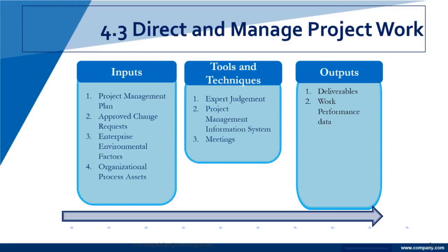Who's doing what work and how are they doing? You may have to deliver that to someone because you're in maybe a matrix situation. The functional bosses of people may want you to give them a report. If you're working with a development team, that development manager may want to know how they did. Testing team, same situation. It depends on how the organization works, but it's typical that project managers, as part of directing and managing the project work, would have a deliverable of work performance data to somebody.